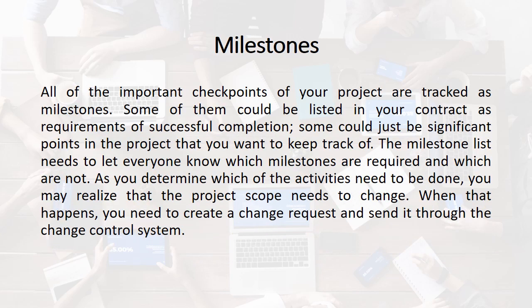Milestones. All of the important checkpoints of your project are tracked as milestones. Some of them could be listed in your contract as requirements of successful completion. Some could just be significant points in the project that you want to keep track of. The milestone list needs to let everyone know which milestones are required and which are not.